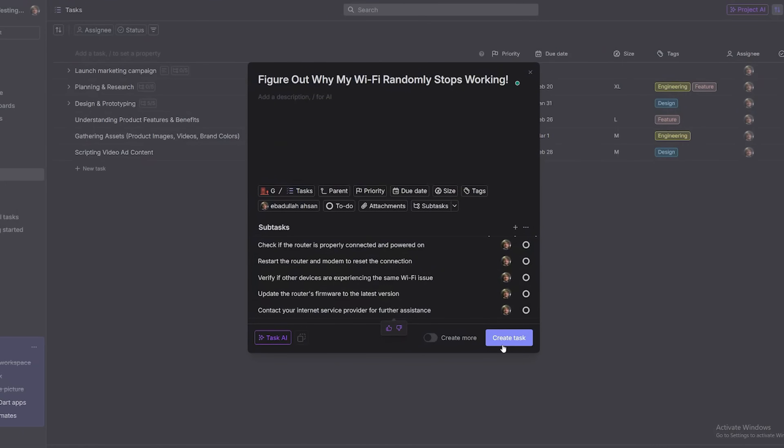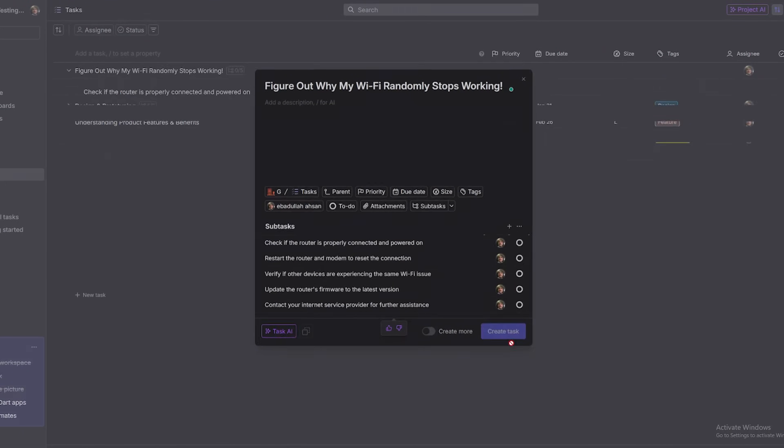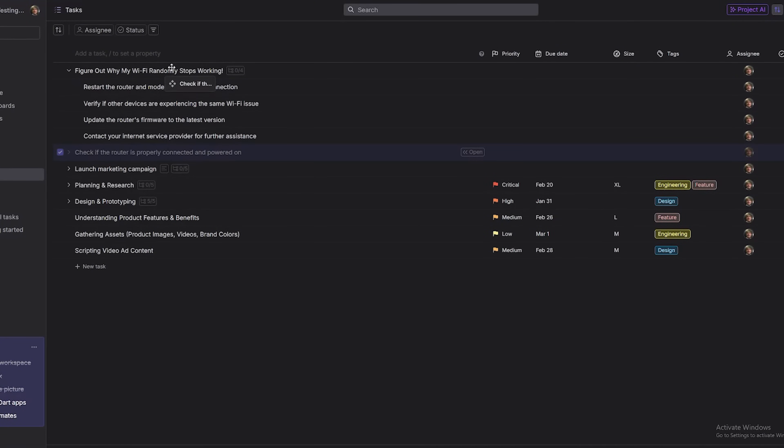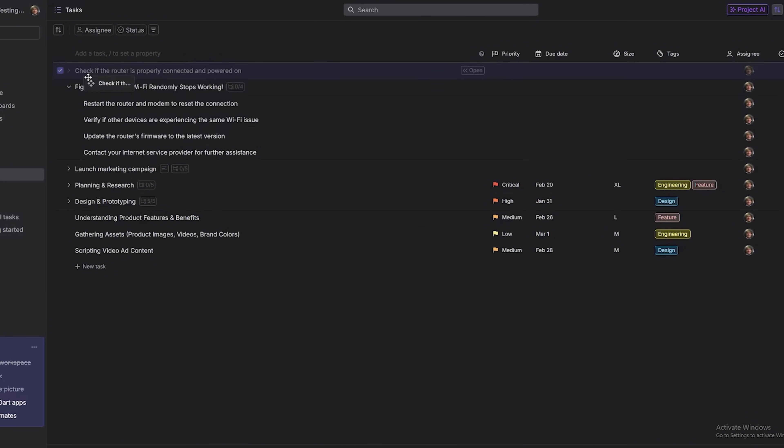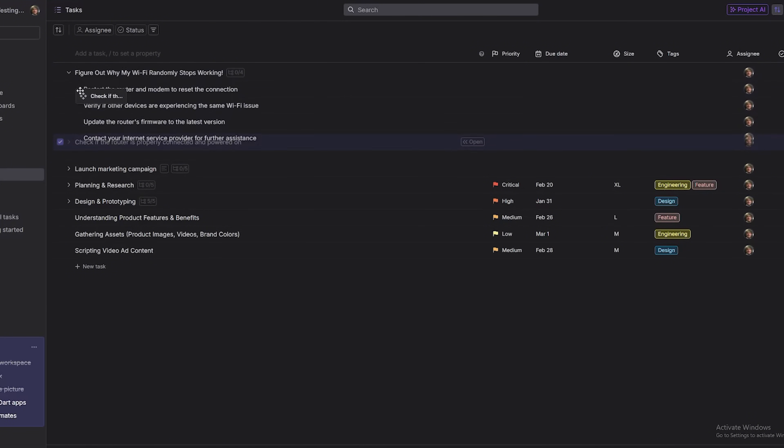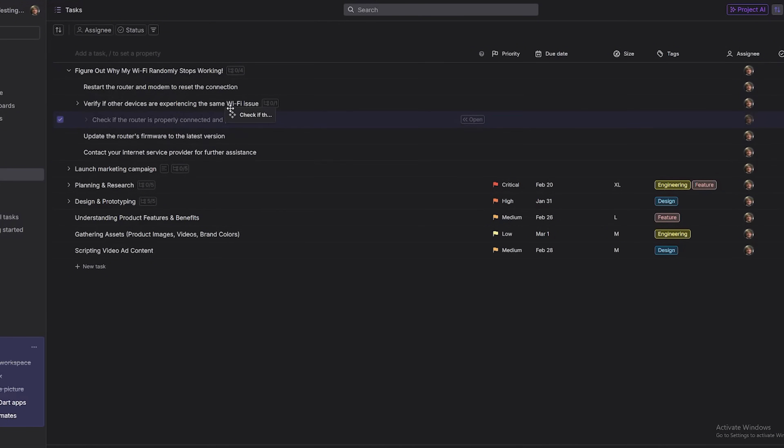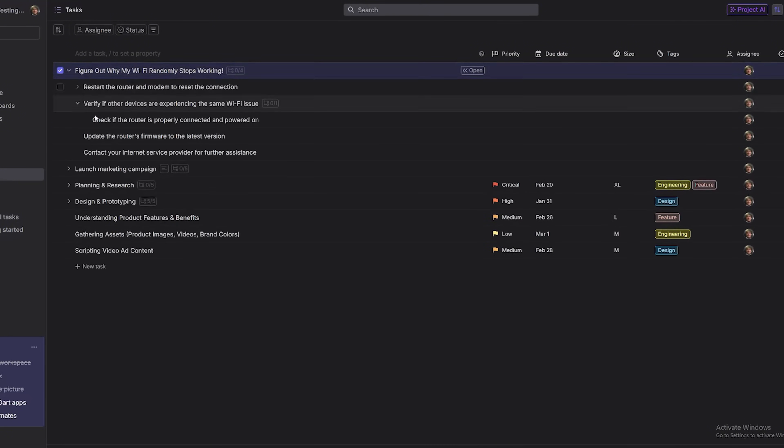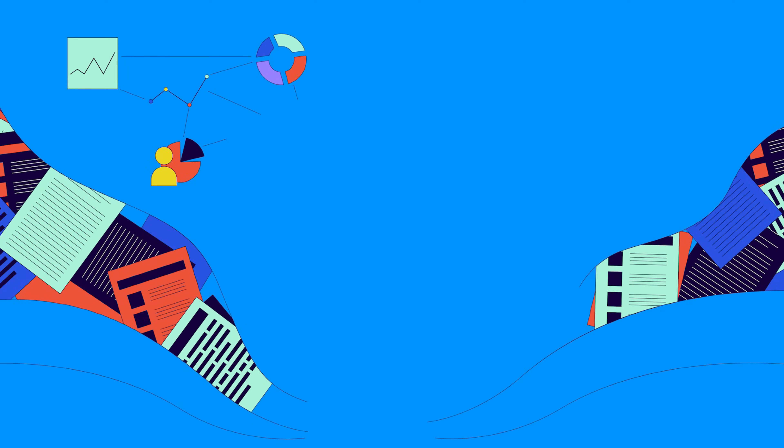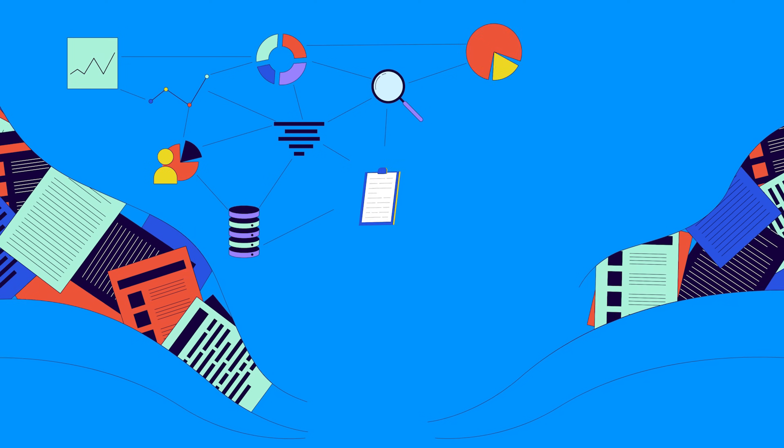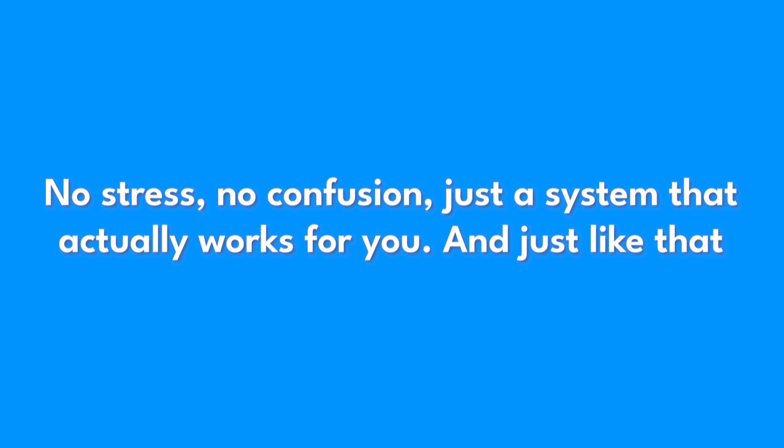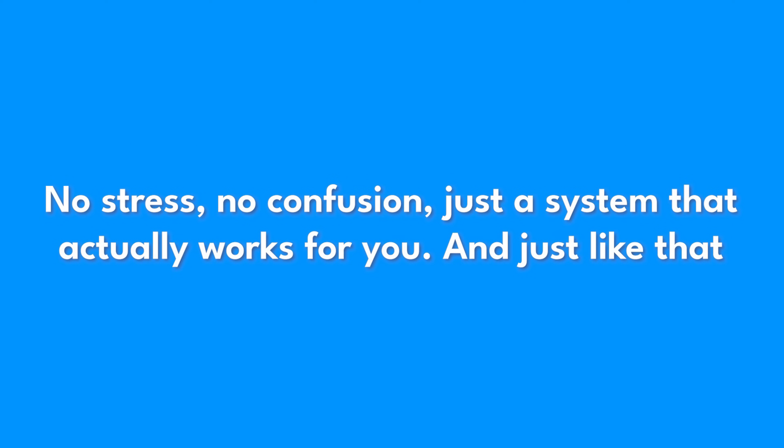Click Save to lock in your main task and its subtasks. Need to change the order? Just drag and drop like a boss. Want subtasks to stay neatly nested under a main task? Drag them under. Boom, perfect structure. Your project is transformed from a chaotic mess into a streamlined, organized workflow. No stress, no confusion, just a system that actually works for you.